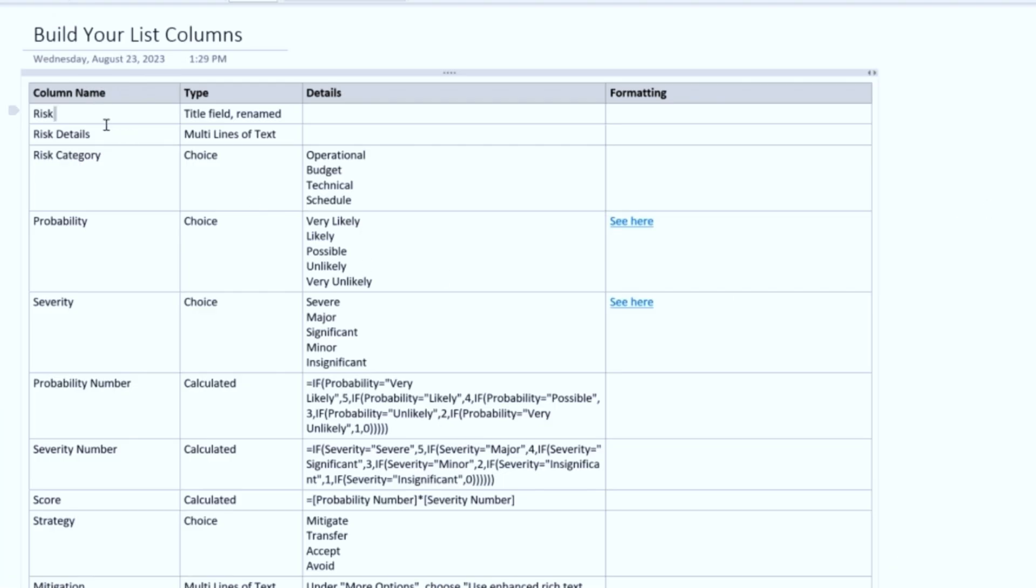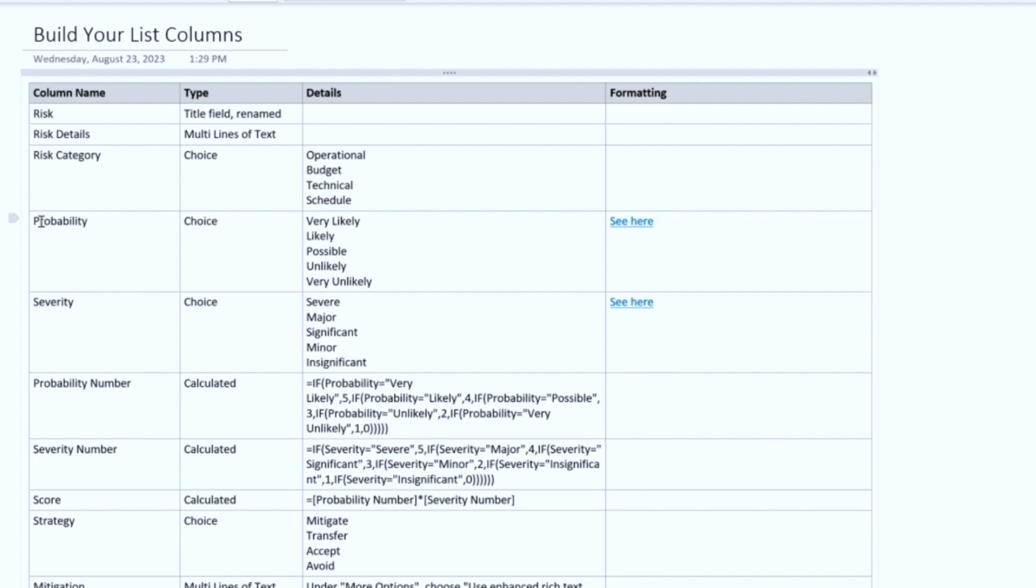So we're going to have a Risk column. That's where you enter the actual name of the risk. Risk Details—those are going to be the details of the risk, so you get to give a little bit more description, go into further detail. Risk Category is going to be a choice field, and that's going to have these choices: Operational, Budget, Technical, or Schedule.